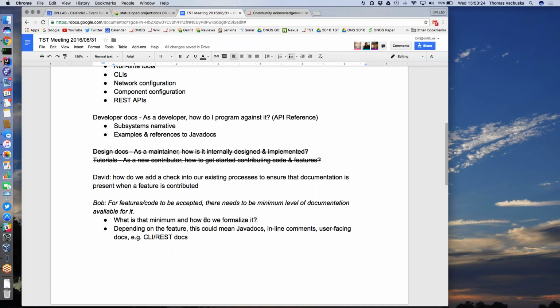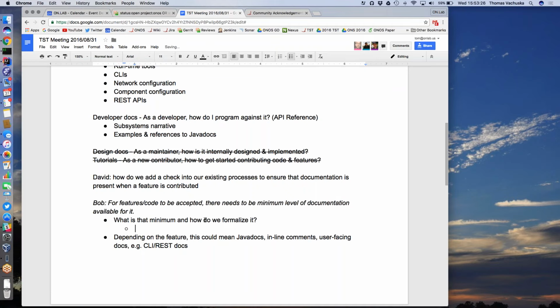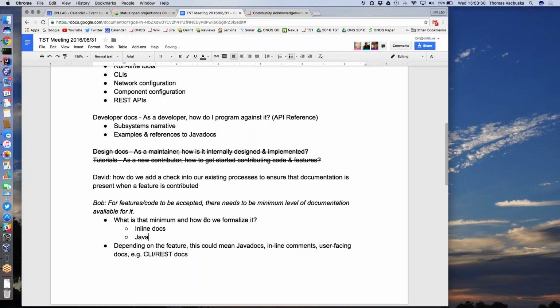Another is that we think there should be a documentation backlog, a backlog of tasks that need to be done, and we should be able to determine whether there are showstopper documentation bugs, where we really don't want to ship the release until we document feature X. Having a documentation backlog is important. It's been difficult to build that backlog for a variety of reasons, but basically, that's something that I think we need to do.